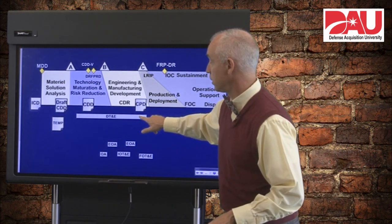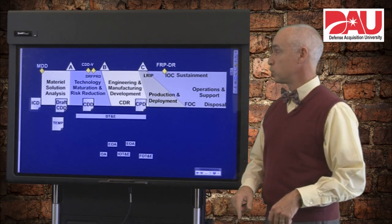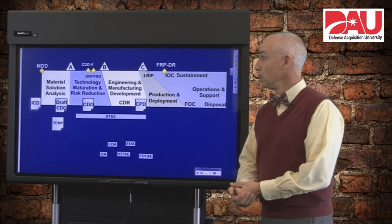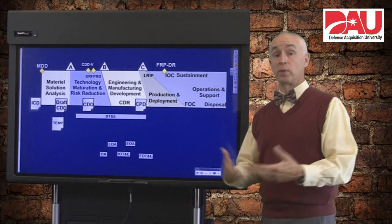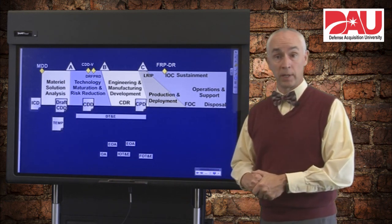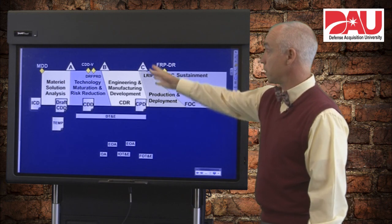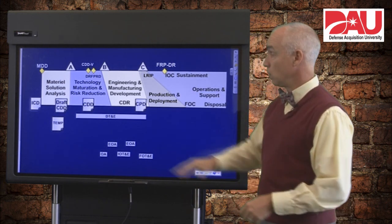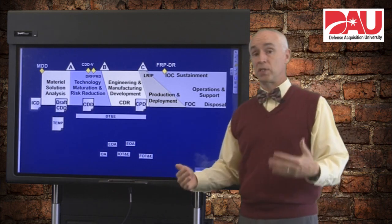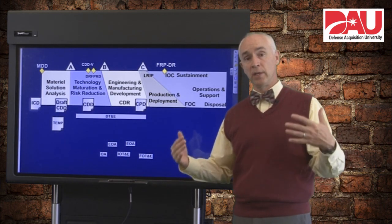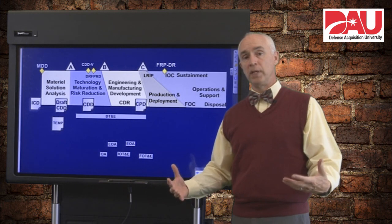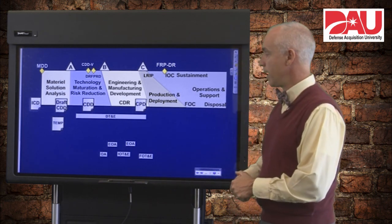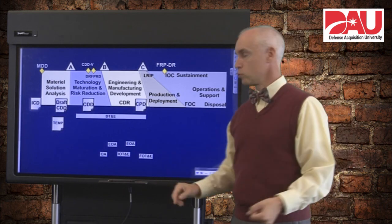Developmental testing is going to start kind of early and often. As soon as we have folks on board to do prototyping and technology maturation and risk reduction, we'd expect to start doing some developmental testing. And that's going to run all the way through about Milestone C, because all through here we're going to be checking to see how the system design is maturing and how it's doing in terms of meeting our critical technical parameters and design requirements derived from the user's requirements.